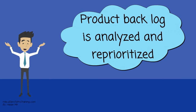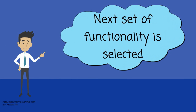Once a Sprint has been delivered, the Product Backlog is analyzed and reprioritized if necessary, and the next set of functionality is selected for the next Sprint.